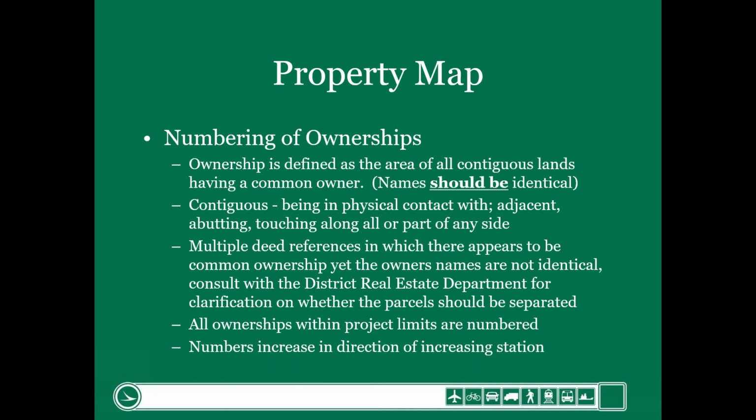So for example, if it's James J. Smith and the abutting property owner is J. Smith without the initials, they as the designer will identify them as two different property owners in the beginning. Now later on it might be combined, but because they're not identical, our designers are not title experts, they're not title agents, they didn't do a title report, they basically are pulling the information from the auditor's tax maps and the current deeds.